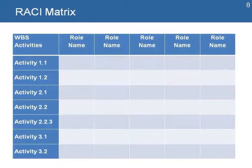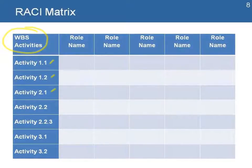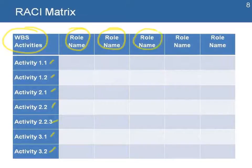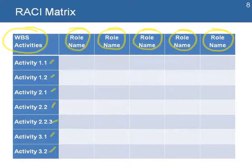Let's look at the matrix. We use descriptions and information from our WBS, where we list all our activities in one column, and then we add columns for each one of the roles in the team, placing the names of each person — the project manager, technical people, administrative staff, and everybody involved in activities in the project.